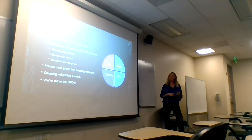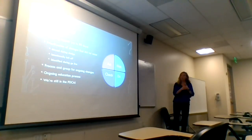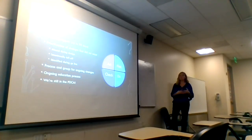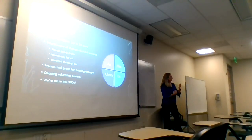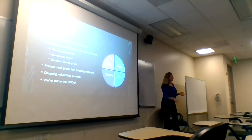And then post go live. A lot of times that can go on for 90 days, for us anyways. We'll take a look at those changes and requests that came up and prioritize. Do they really need to get done, or is it something we need to push off? Is that additional cost, like another $50,000 add-on? Things like that. And then identify a process and a group for those ongoing changes.